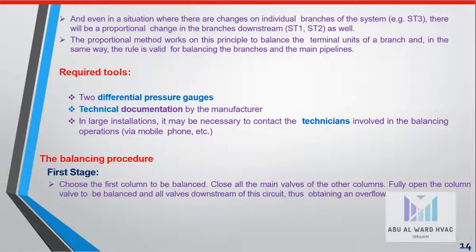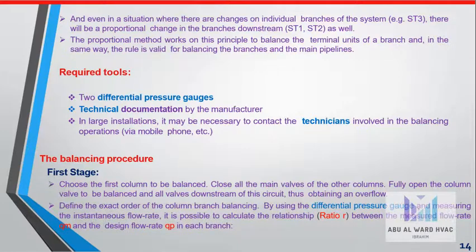First, we have to choose the first column to be balanced. We have to close all main valves of the other columns, fully open the column valve to be balanced and all valves downstream of the circuit, thus obtaining an overflow. We have to define the exact order of the column branch balancing.